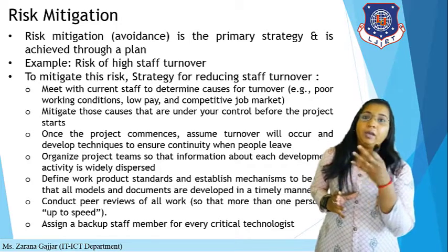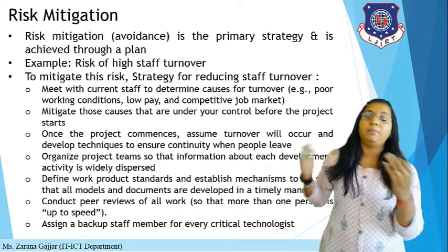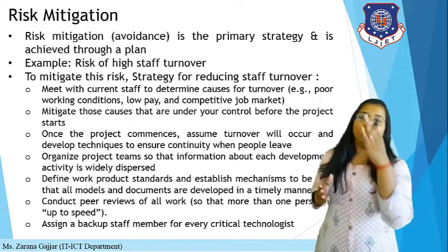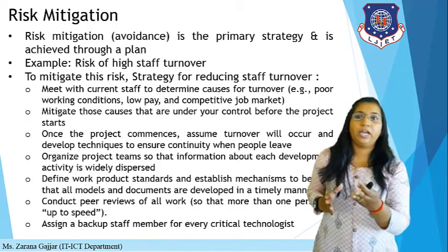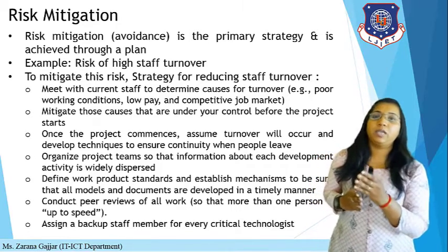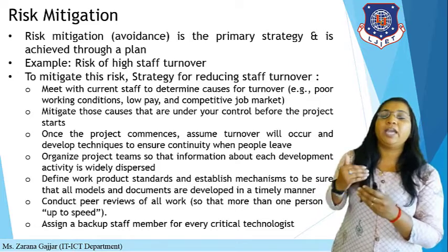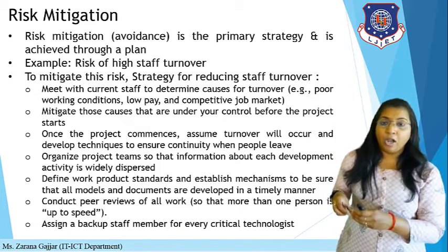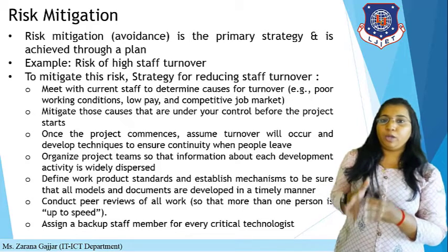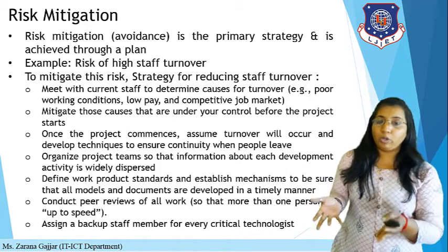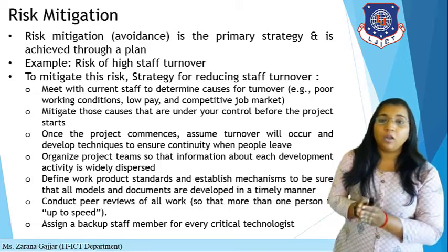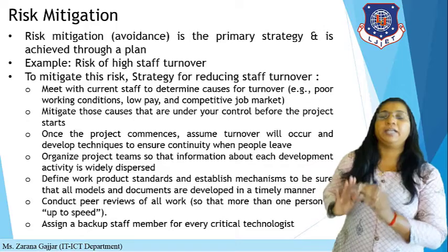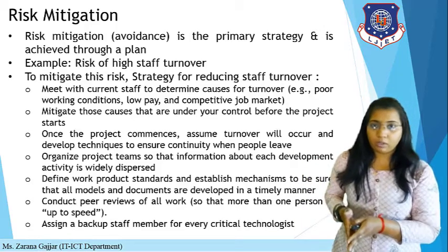Then low pay and a competitive job market. There are multiple jobs available in the market, and your employee moves from one company to another, so that will also lead to high staff turnover. Next, mitigate those causes that are under your control before the project starts. For example, you can sign a bond, a contract with all the team members, so that if this project is completed, then and only then can they leave the company.